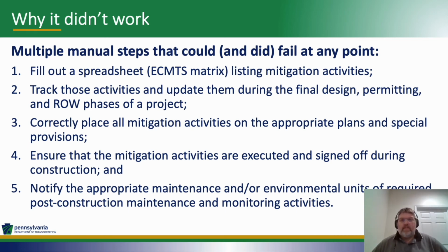Then everything needs to go from the spreadsheet to the appropriate plans, such as showing wetland fencing on the erosion and sedimentation control plan, and creating special provisions for mitigation activities that require them. After that, all of these things need to be communicated to the contractor and make sure that those activities happen during construction and get signed off when they're completed.